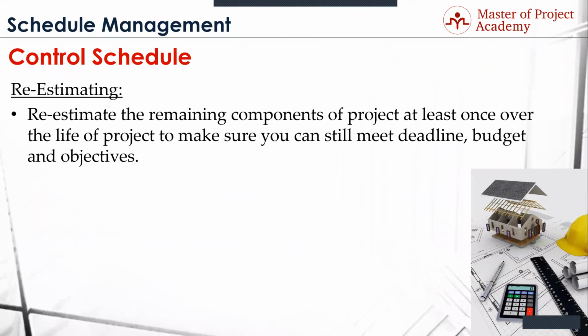Now, the other thing here is in re-estimating, you can start over if you want. And there's a lot of estimating that basically says, we really screwed it up at the beginning, let's re-estimate. And there's some true reasons for re-estimating. Maybe your original data was messed up. You estimated based on having 5 engineers full-time, and now you only have 3 part-time, and they're all rookies. That changes your estimation.